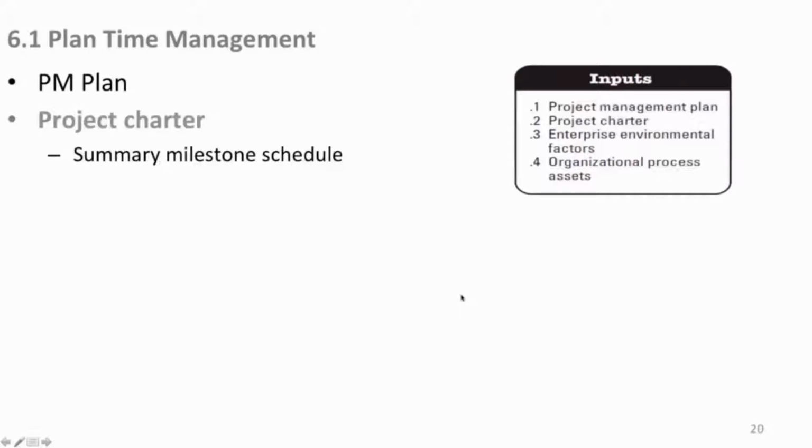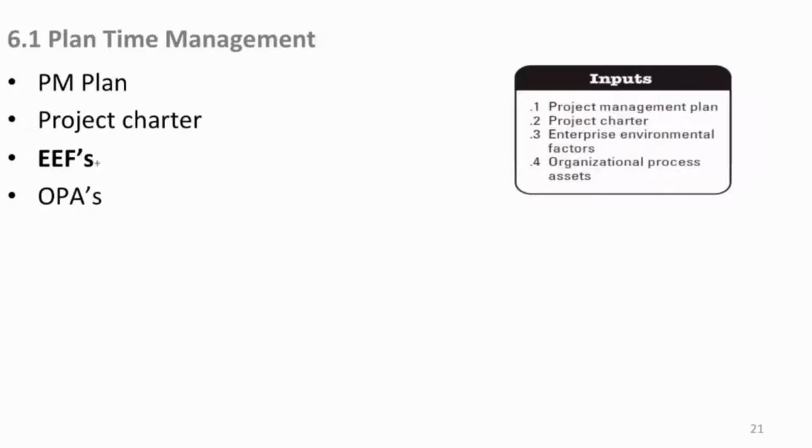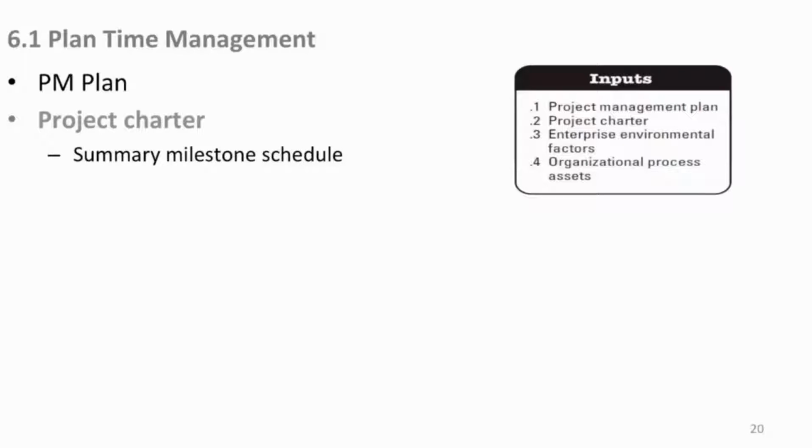Your project charter again comes in because you may want to get a sanity check against the milestone schedules that are in there way back when. And sometimes, by the way, in these project charters, they may have mandatory milestones. You'll know this way up front when you do your charter, and somehow you need to gear your project to meet these milestones. And there are methods of compressing the schedule if in fact you need to do that, and we'll see that later.